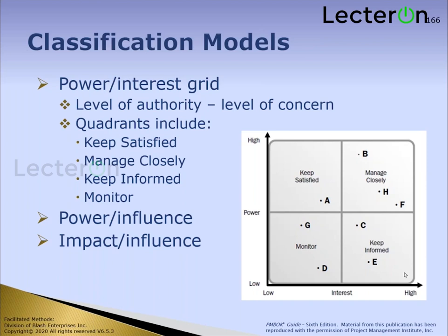This one to me is the interesting quadrant. And actually, personally, I spend more time with people that are in this high interest but low power. That's because those are the people that are going to be affected by what we're doing. They're interested in the project mainly because it probably affects them directly. They don't have a lot of power, but they know what's going on. These are your people that are working out there on the line.